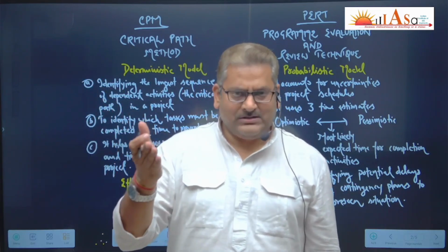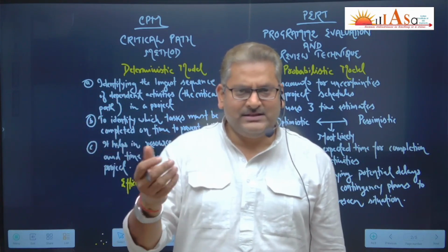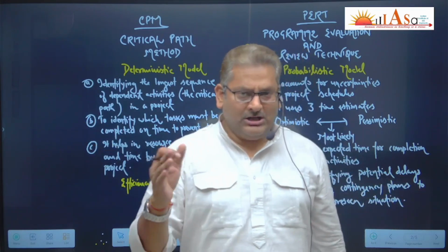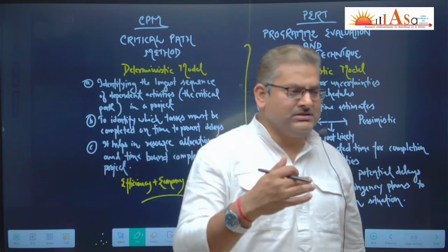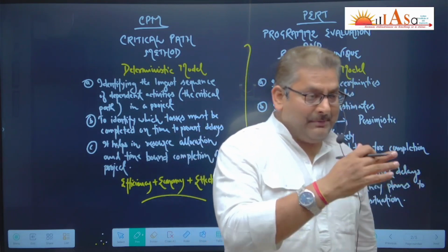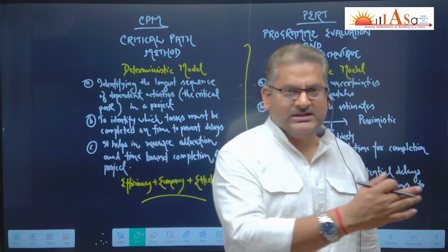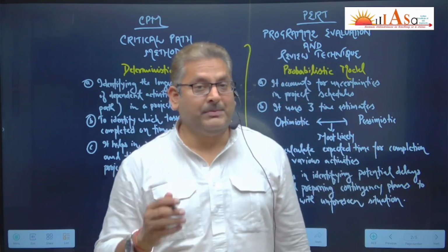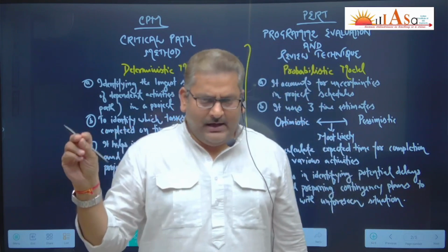First of all, in the first stage, acquisition of land. Then in the second stage, development of that land or some basic infrastructure. Then you deploy the workers, laborers, for the second phase of activities. Then materials and machines are to be deployed depending on the stage of execution, because if you deploy machines earlier, it will not be cost effective. You will be paying for those machines. So when it is required, you identify different activities.